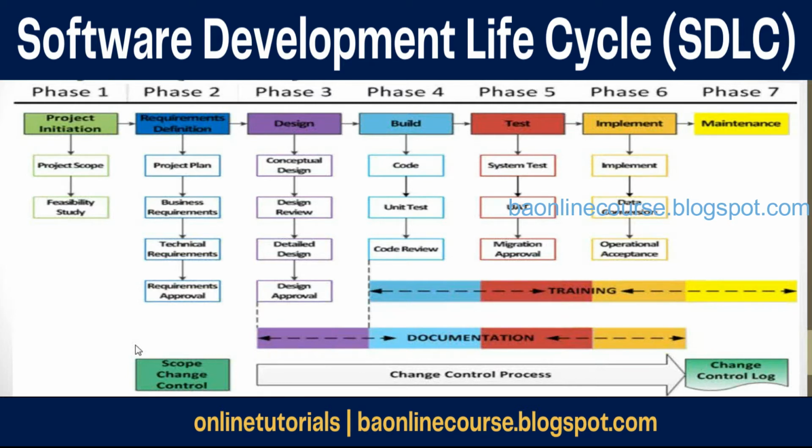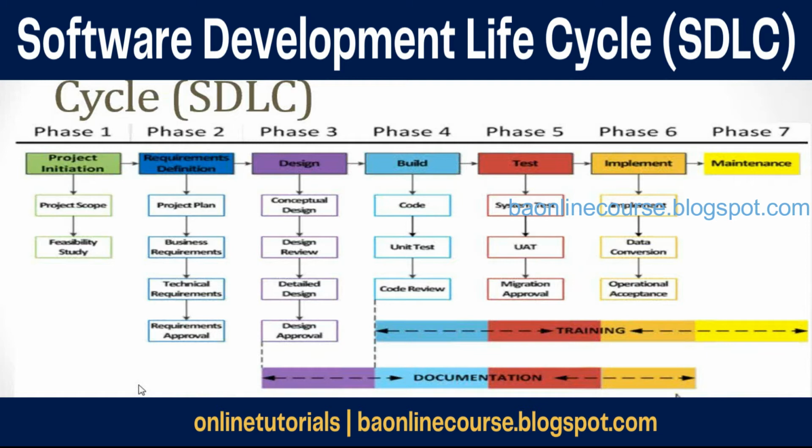Okay. Any project you take would generally tend to have these 7 phases. Okay. So first phase is where you would identify the projects. You would identify what kind of projects I can take up. Then is it feasible or not? How much would it cost? Is it financially feasible? Right. And then you would present it to your senior management and get approvals. Okay. All those set of activities would be under the project initiation.